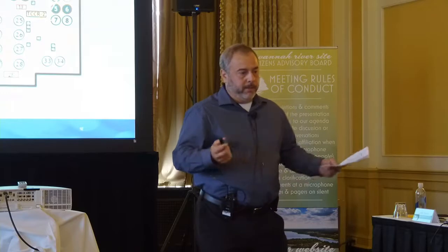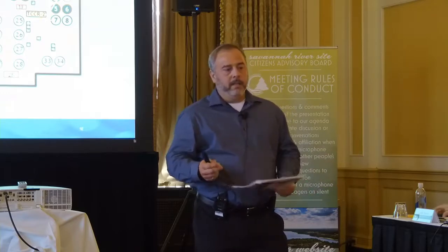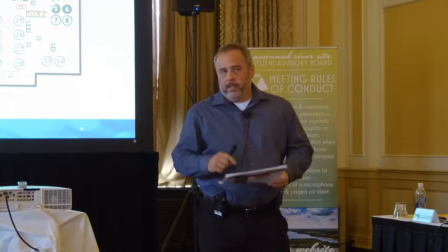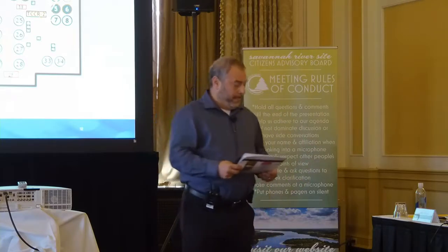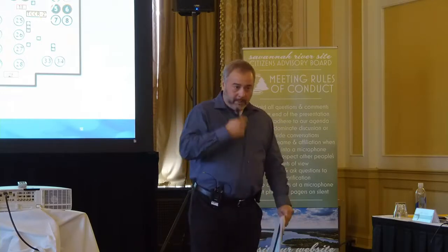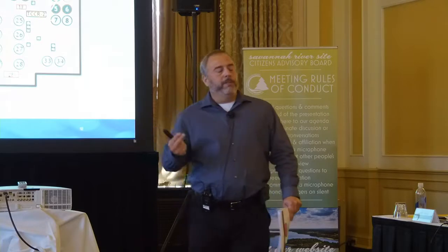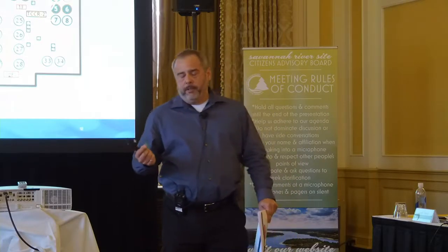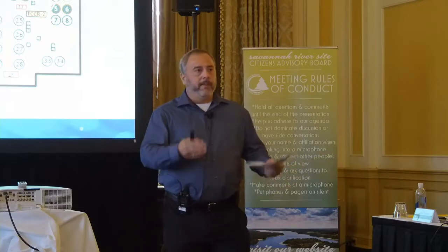We're working on Tank 9 quite diligently. We've got it broken up into 2 different phases. One is the ticker phase for Tank 9, and then the other one is the salt dissolution phase for Tank 9. Over on the ticker side, we've got procurements at different stages for new pre-filters that will go into the ticker unit, new ion exchange columns, because obviously we have 4.